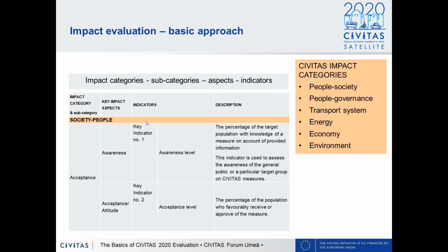That's one important remark. The other important remark is that some of these indicators are really quantifiable elements. We can count things, we can measure things, but some of these indicators are also more qualitative. And sometimes it's possible to add a kind of scoring system where we say, before, this characteristic is on level 1, and taking into account these changes and improvements, now it's on level 3.